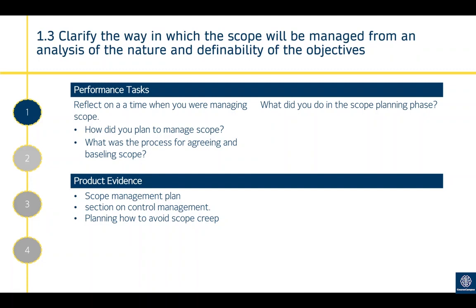If scope isn't clearly defined, lots of additional tasks and activities will just be thrown into the project. To complete those extra activities will take more time, so the project will go over time and also over budget. Ultimately it could result in project failure, where the project sponsor says the cost outweighs the benefits — and if the costs outweigh the benefits, the project will be cancelled. That's why it's important to manage scope — avoid it becoming bloated and resulting in failure.